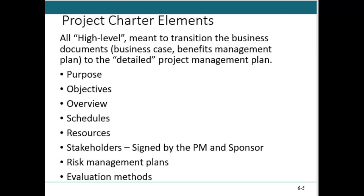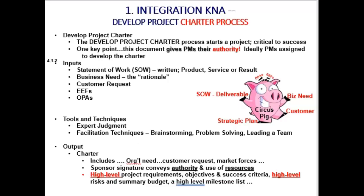So in the charter, we're looking to cover the items on the slide. You don't need to memorize the charter process — this is just what makes a great charter and what the charter does for you. Notice I've highlighted: once it's signed at the end, the sponsor is going to sign it, and frankly the project manager should too. It gives the project manager legal authority to use resources, and besides the legal authority, it formally initiates your project once it's signed. And again, it's all at a high level.